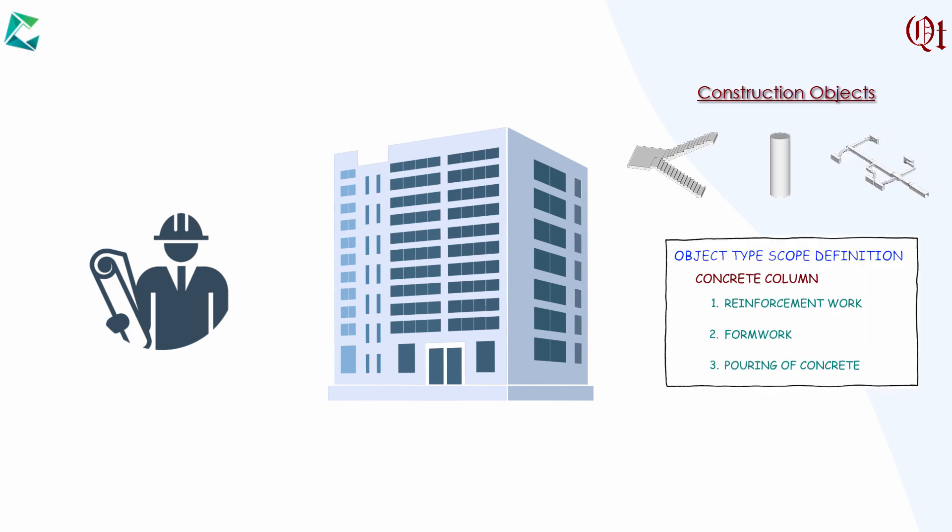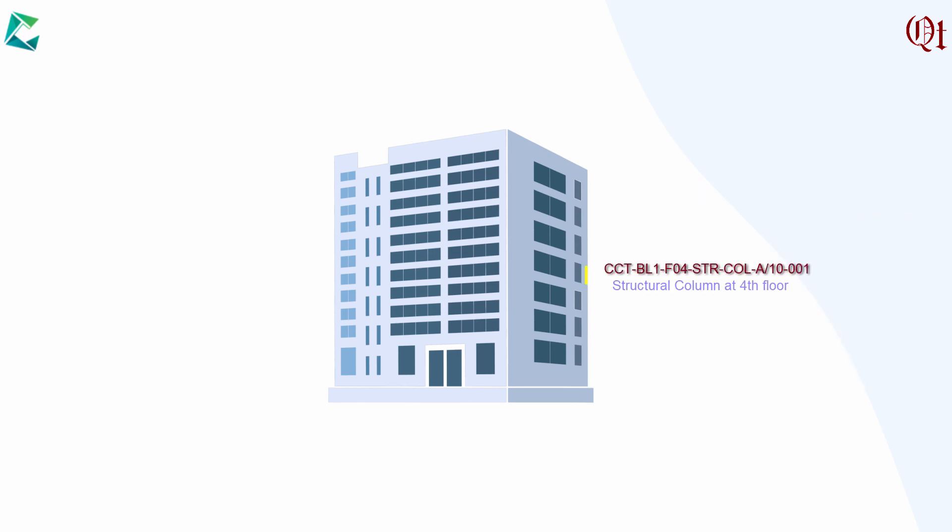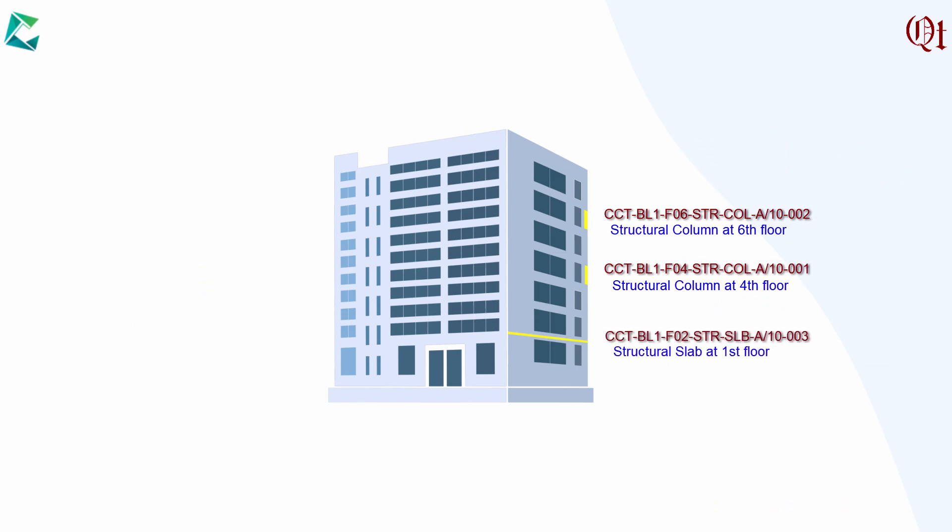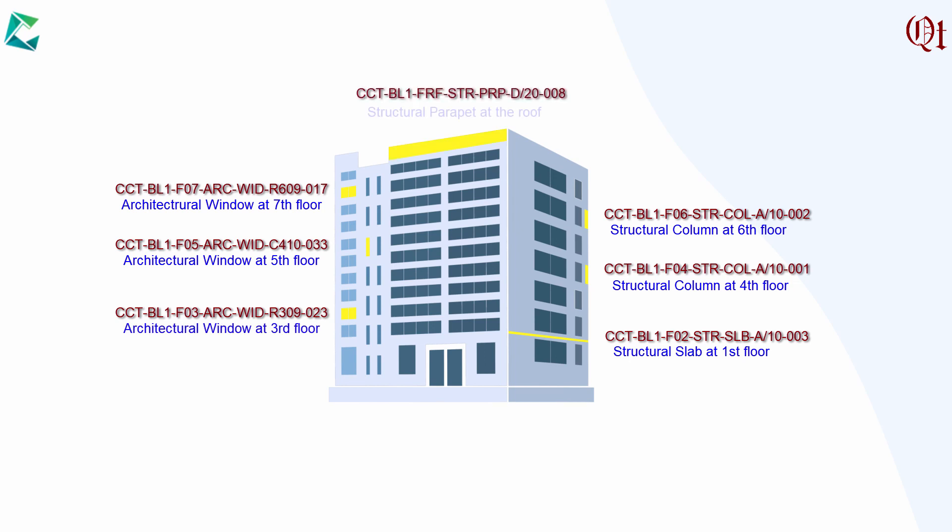Special unique intelligent IDs assigned to these objects are called construction tags. Typical construction tags contain project WBS information, object trade, sub-trade, etc. BIM object tagging allows users to generate unique tags for each construction object. Unique tags are generated in the scope of construction objects, not graphic elements.